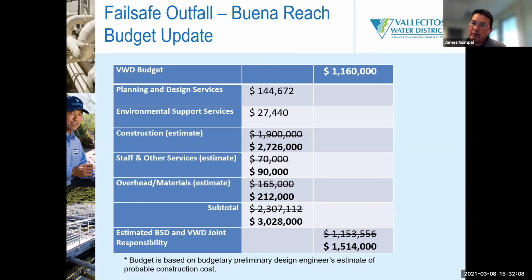But in areas like the fail-safe where the pipe is primarily empty, and then when we use it, it fills up, and then it's empty again, and there's air, it's really not the right material to use, and we're seeing fairly large corrosion. And now with the rains and with the time, since this pipe is basically about its age limit for a pipe like this, we're seeing more and more failure points on it. So it's due. We're doing condition assessment. We're doing replacement on these pipes, and both the committee and the board are going to hear more from probably Susan and Ryan over the next coming years of different sections, because it's a big pipe and we can't take the bite all at once, so we have to take smaller bites of it.